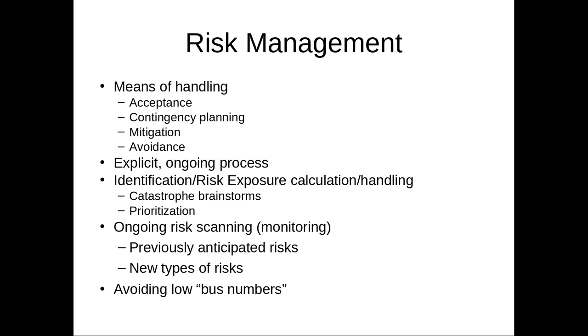By contrast, what is contingency planning? You do it after the risk materializes. Yeah, but the key thing is you have a coordination plan. So you have a plan: if this is coming about, we'll undertake this. So everyone's on the same page, if this happens, this is how we're going to handle it. And so if it does come about, you're not scrambling and trying to figure out who's going to do what, and who's going to take responsibility for this.